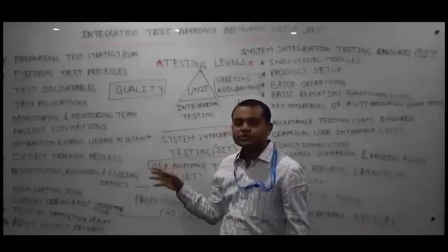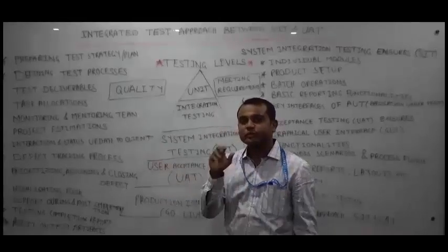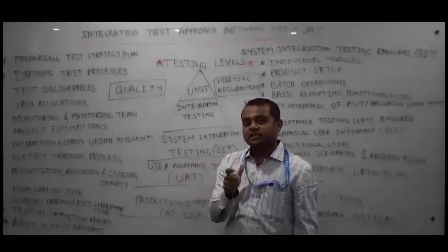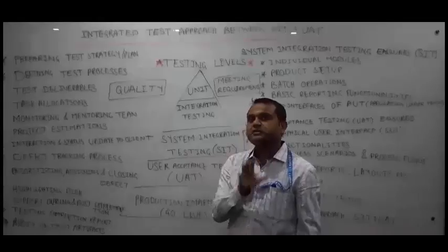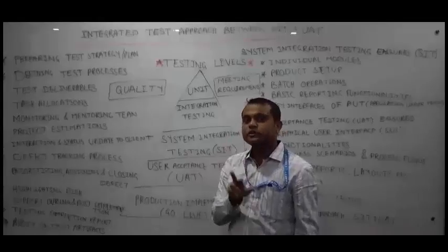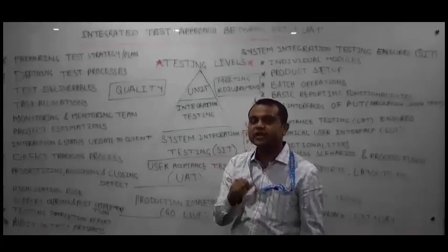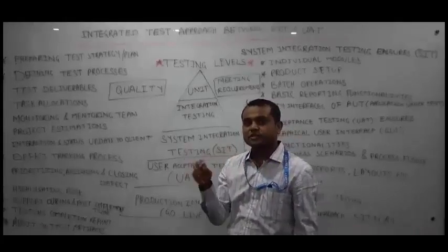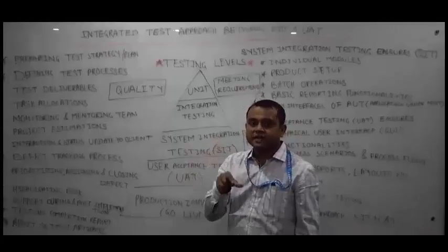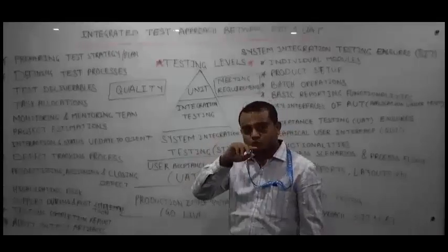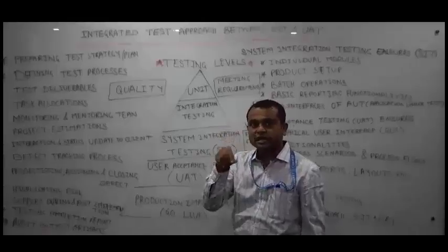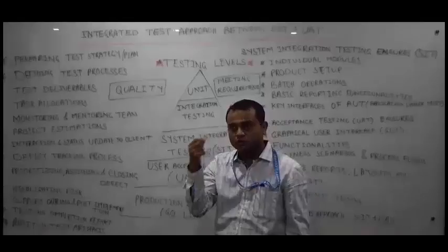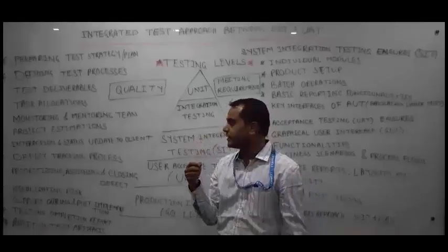Then defect tracking process. In previous scenarios, there would be 2 defect managers, one for UAT and one for SIT. But in this approach, like a project test manager, there will be only one defect manager, and he will track both defects of SIT and UAT from start to end. Once he discusses with stakeholders if any defect gets reopened, then he has a responsibility to interact with all stakeholders and get it fixed, or get it assigned to developers, or get it deferred. Okay.